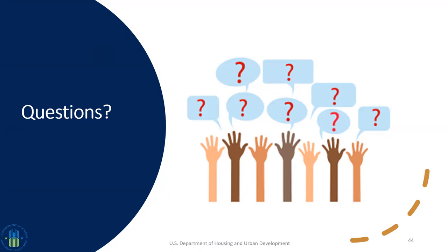But a lot of times what we advise PHAs, if they're going to lease up before the RAD closing, is that when they do their move-in consultation with the residents, you can communicate to them at that point in time what the conversion plans are and what to expect as far as the changes in their lease when the property does convert to Section 8, and that can be satisfied through that initial move-in process. So it does allow the PHA to satisfy their tax credit requirements, but what we have seen is that then pushes their RAD closing date out a little bit further, maybe 2 months, I think was the most recent one we saw between RCC and closing.